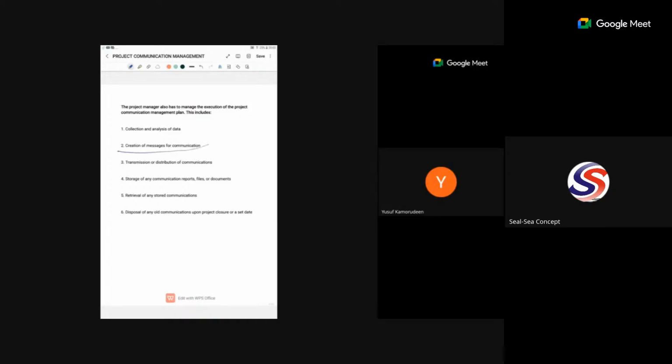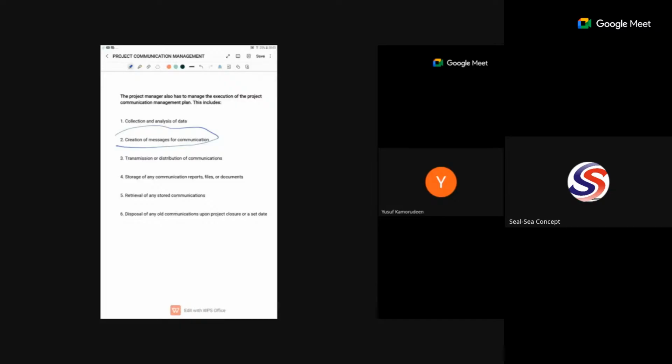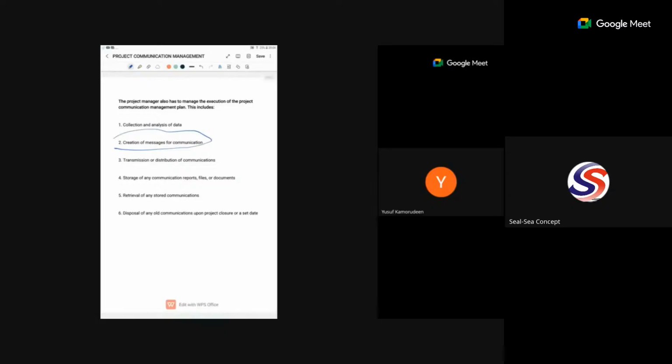You must be sure that, yes, you have made plans that your messages for communication will be created. This is the process where you now create those messages. You have decided on their format, but in management of the communication, this is where you create those messages. This is where you send those messages as you have planned to be sending them. This is where you have documentation of all your reports, all the files, and all the official documents that may have something to do with the project. This is the process where you get all those things in order. Any stored communication that you may have to recall, this is where you work on retrieving them. Any old communication that you may have to dispose, this is where you carry them out.